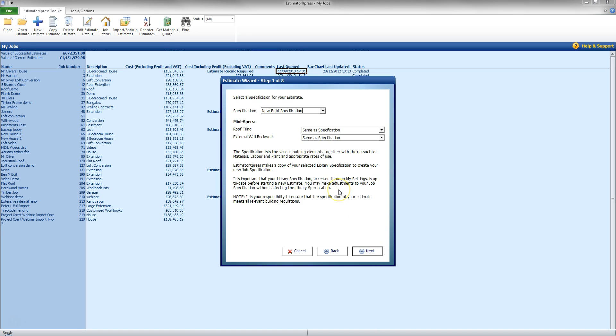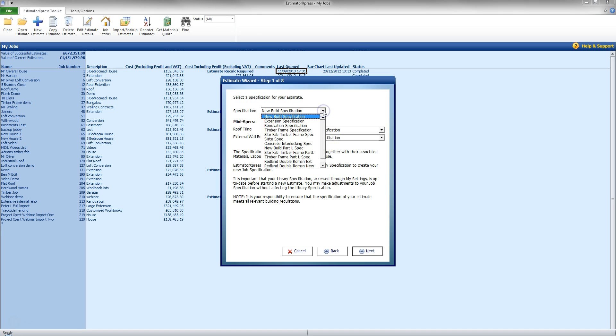On the next page, we have an option here to select a specification. Now for this job, it is an extension so I am going to go to this drop down box here and I am going to select an extension specification. Now this will give me access to minidiggers and skips to remove the waste.